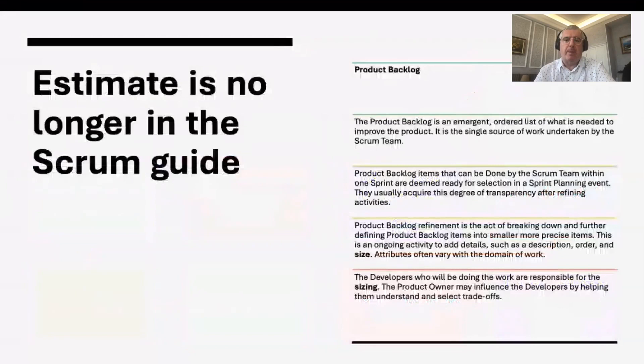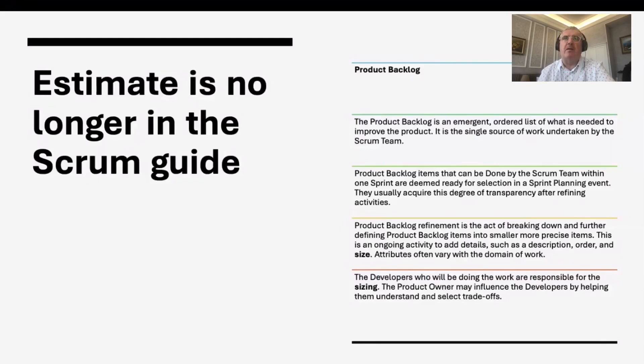Looking at the Scrum Guide — this talk is primarily about sizing and forecasting in Scrum. The word 'estimate' is no longer featured in the Scrum Guide. In 2020, there was a change to focus more on sizing. This may be influenced by the Kanban Guide for Scrum Teams and its flow metrics. There's a new focus on throughput — how many items are we finishing — as an option to consider.